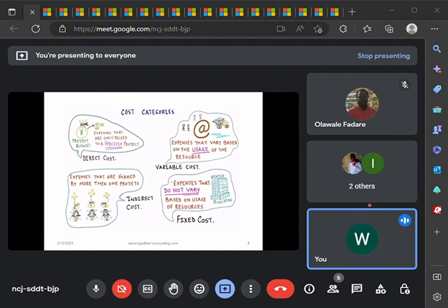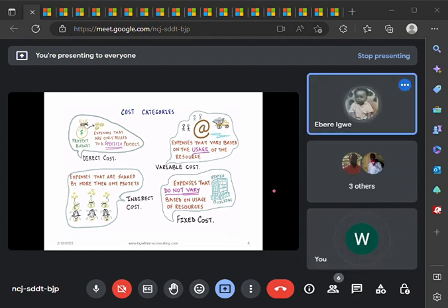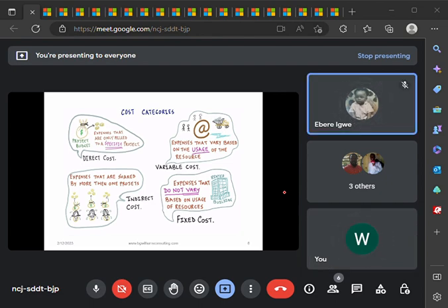So if we have 10 projects that we want to work on, those 10 projects benefit from that Wi-Fi. So they are more like those costs incurred for the benefit. That is why we use the word shared on the screen. Like for instance, your fringe benefits, the cleaner that comes around to clean all the offices, but each office is having a different project they are working on. And the janitorial services. So that is what the indirect cost is.